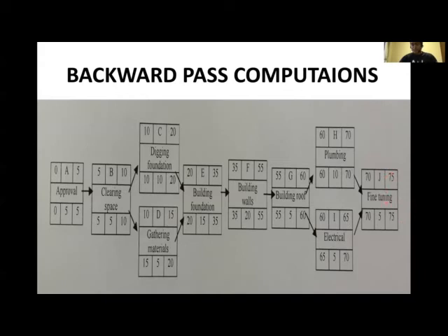So if you followed, the critical path is going to include A, B, C, E, F, G, H, and J. Why? Because these activities don't have the float. So you can say the critical path is basically this path here. As you move along this path of a project, never delay anything. Otherwise, the project will be delayed.